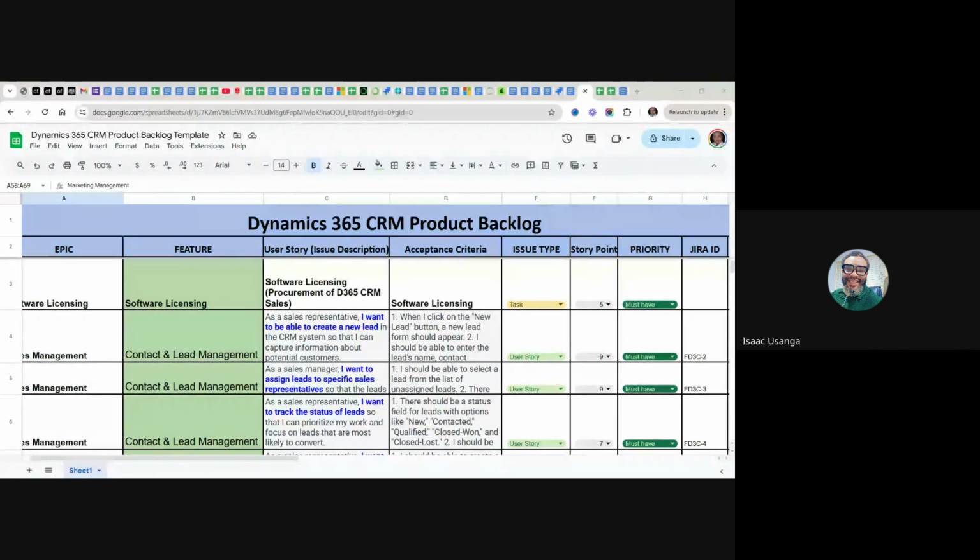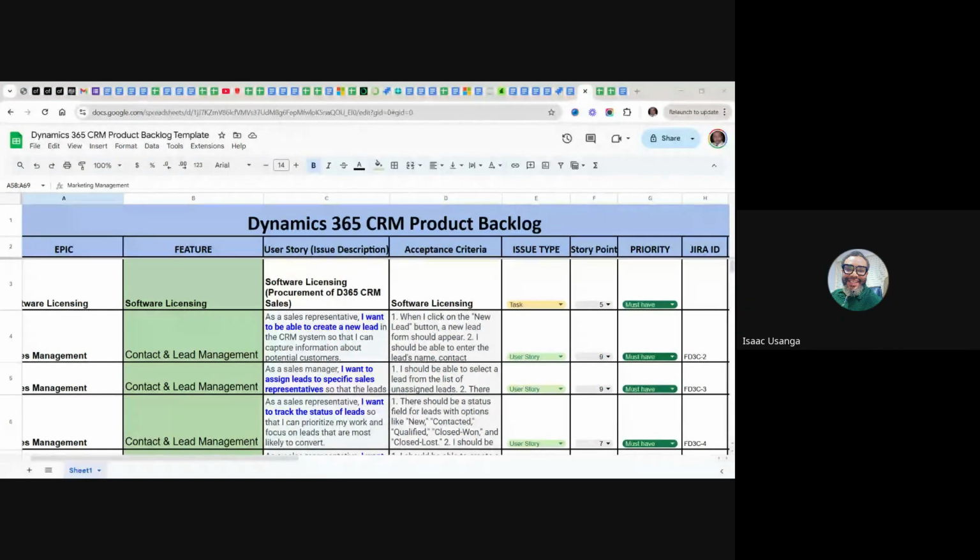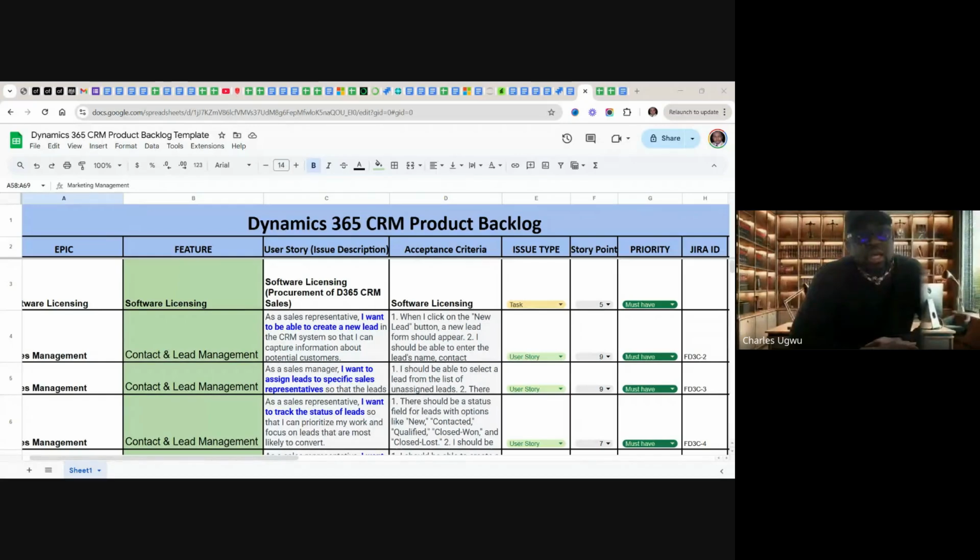The way it happens is that when a sprint starts, you cannot add any more item on that sprint when they have started building. But you can remove. Are you getting it? You can remove some work. Any item you feel is no longer relevant, you can remove it from the list of items they captured.